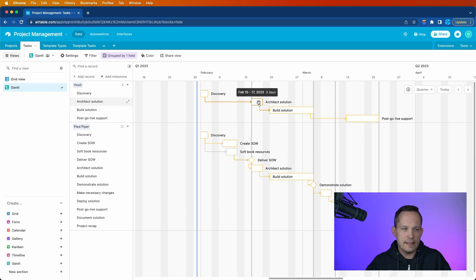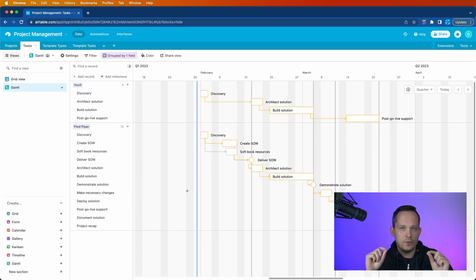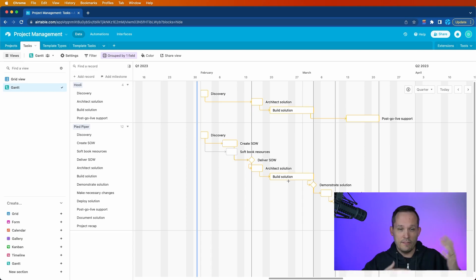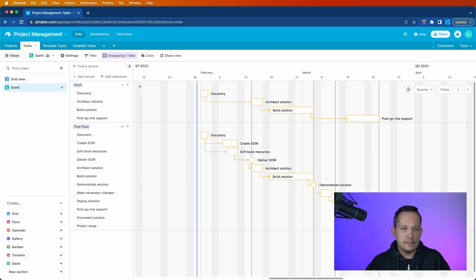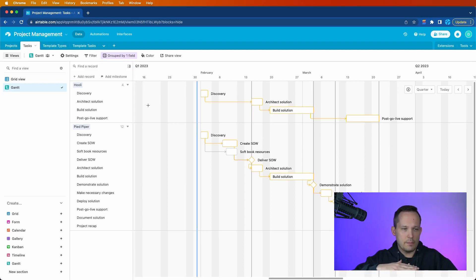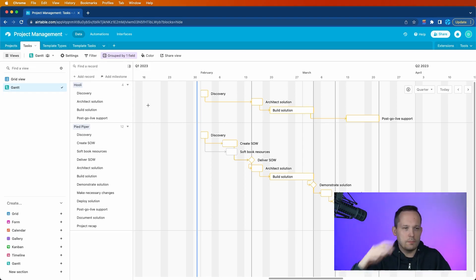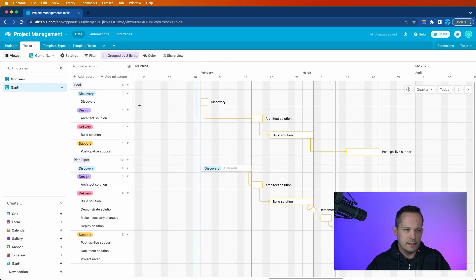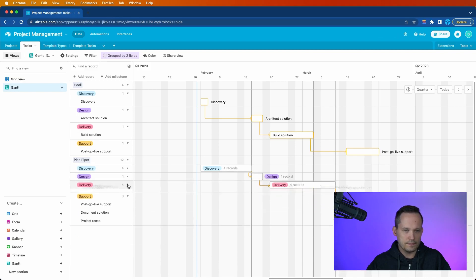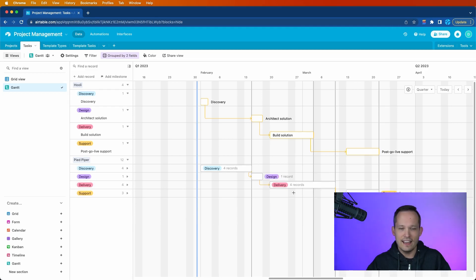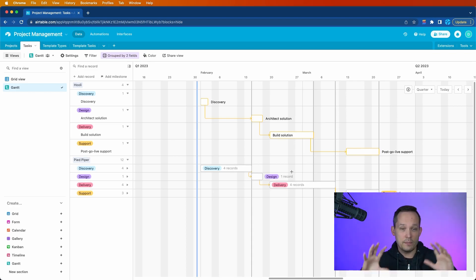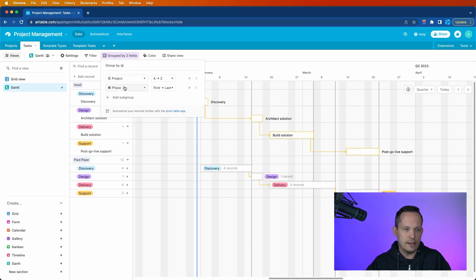I would say that even though we've got the ability to look at multiple projects at the same time, I think this works well if you have just a few tasks for your projects. But I showed basically a simple example of a project in my world. Typically, we'd have maybe 50, 60 tasks, and that's going to be very visually complex. Another thing that's pretty slick with this is if you are kind of thinking of it as a portfolio management solution, meaning that you're managing multiple projects at the same time, remember that you could group by another field. So we could group by the phase as a second subgroup here. And where this is helpful is we could go ahead and we could show just the high level phases. And I love the way that that looks, especially in my case as a manager, I don't really care down to the specific task level detail. I want to be able to see the big level phases. I love the ability to use the subgroups here to be able to manage that.